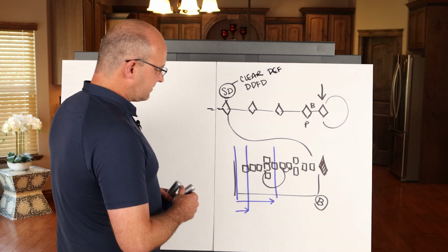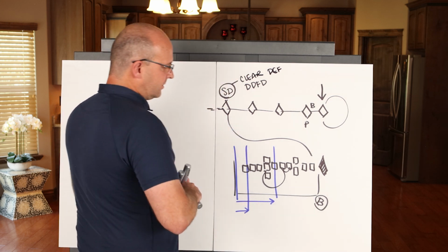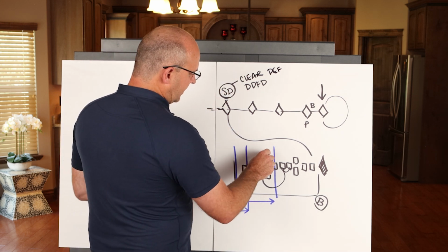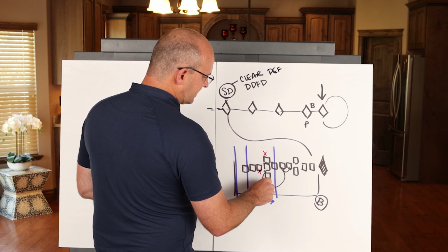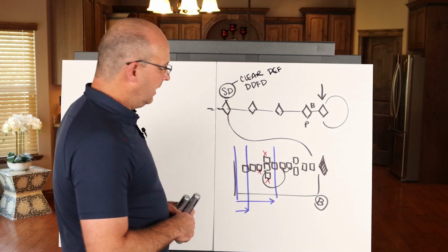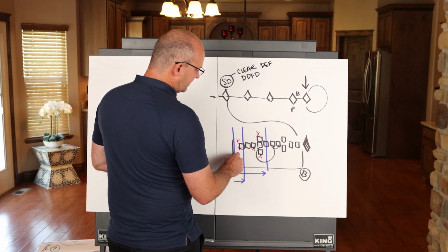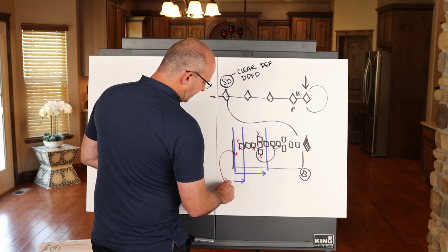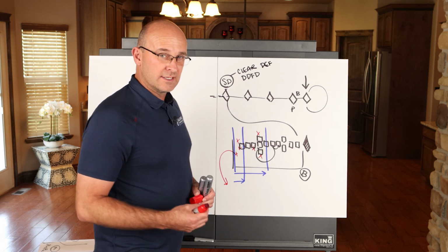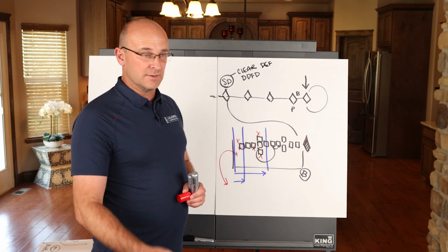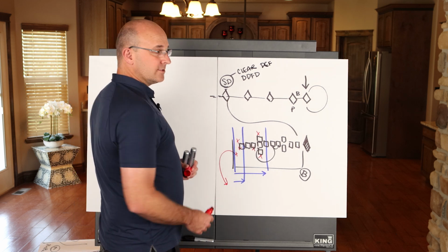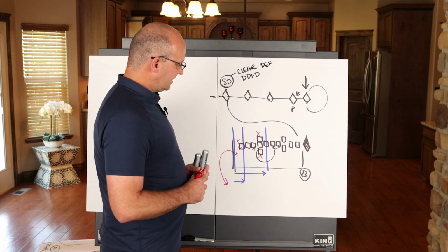Now, if you're using the last planner system, what you'll want to do is not only look out ahead for roadblocks and remove them, because that's really how you get work done well, but you can also look within the week and see if you had any missed commitments, and then start to actually do a root cause analysis based on your percent plan complete. Meaning, if you missed a task, you can say, why? How can we prevent this in the future?